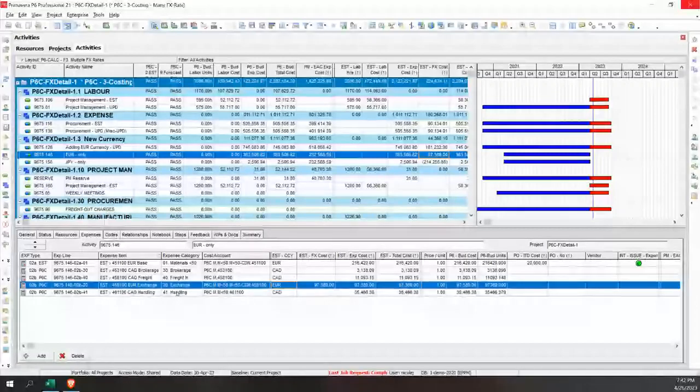And for things like exchange rate, you may have to prepay at least a portion. So your team needs to know in advance not only the amount, but the timing. That's where this can become really valuable for your team in the way they're putting the project together, getting their currencies in place and dealing with the hedging they've got to do.